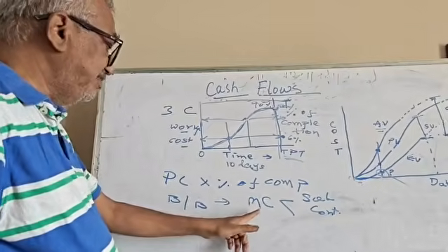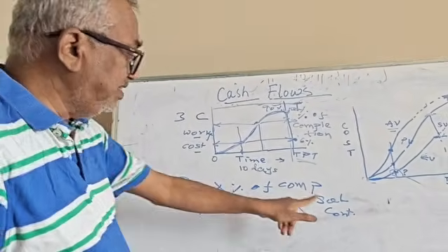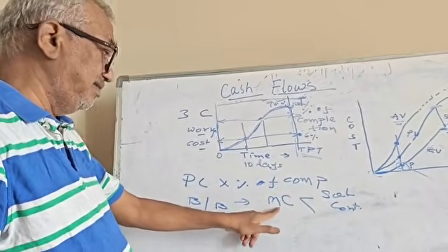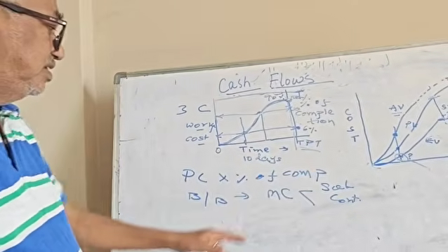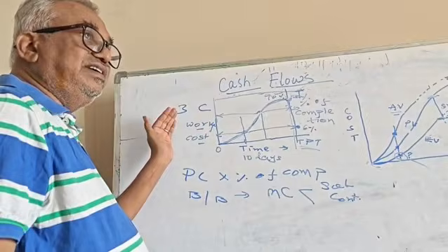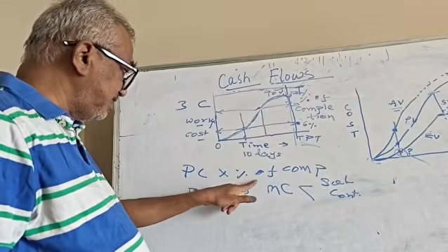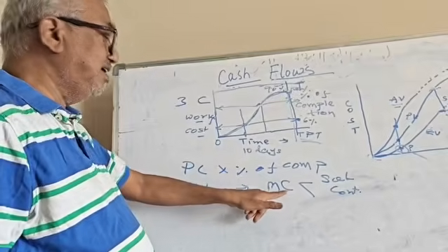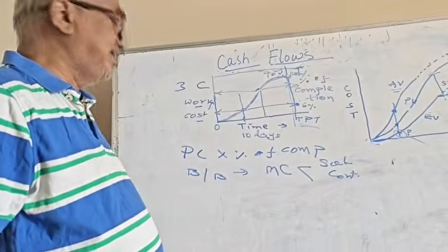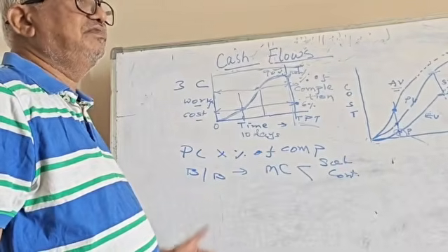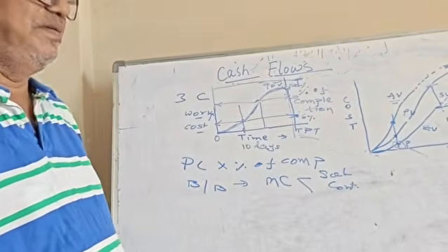So client will choose MC, that is MC means main contractor. The main contractor will hire subcontractors. So this money from the client side, it will be released based on the percentage of completion to the main contractor. Once the main contractor gets the money, then he pays to the subcontractors, that is called B by B. That is back to back payment.